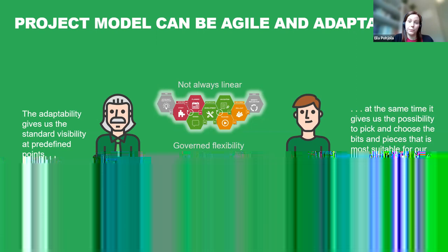So here on the left-hand side, we have our product backlog, which is mostly user stories. They are in Jira. And before each sprint, we do the normal sprint planning, and we take our backlog items to the sprint backlog. It's also in the tool, Jira. And we have the 4-week sprints where 3 weeks is actually development, and 1 week is always reserved for user acceptance testing. And then we always release the increment. So basically once a month, we always release something useful for the users. And as in the Scrum model, we have the sprint review after the sprint and also the sprint retrospective. And then we start planning the next sprint.